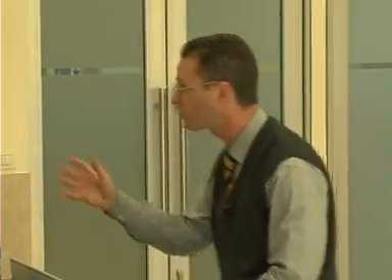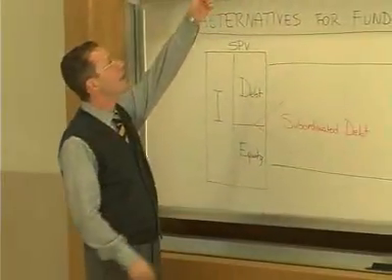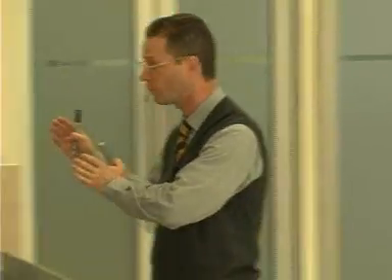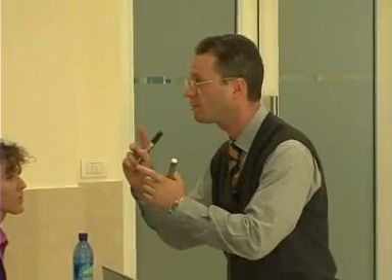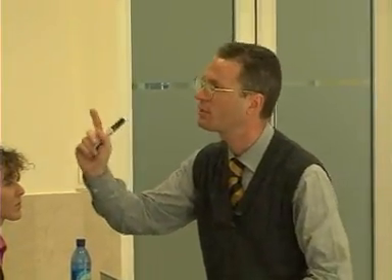And so the total amount to be repaid will be certainly not the original amount of loans, 850, but much more, the amount of interest plus all capitalized interest. Remember this important aspect, okay? So the total amount to be repaid will not be the principal amount, but principal amount plus all capitalized interest, okay?